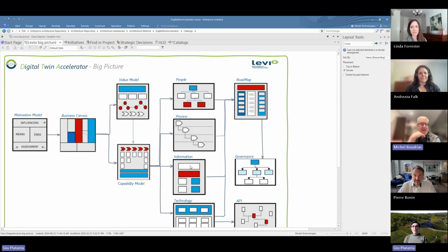It depends on the scope, size. Yeah, but typically we have a template that we have created that we call the assessment, in which we try to define a very short series of activities that will basically go through the enterprise, assess what is the current state, what it is that they want to do, and then propose a very initial high-level roadmap. And that assessment can be done in 2 weeks.